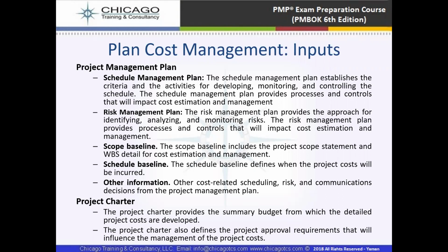So, the schedule is necessary. In any project, the schedule is necessary because based on the schedule, we know how much percentage of progress is to be achieved in each month. So based on those planned values, it gives us the cost indication that, okay, in this particular month, the cost will be more.